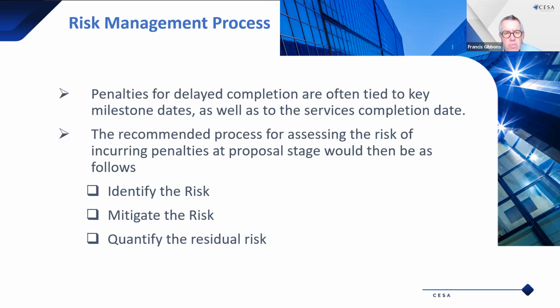And you might think, well, yeah, I suppose the worst case is that there's going to be a 10-day delay in the delivery of that particular deliverable, and let's use our commonly seen penalty of 2,000 Rand a day. So you've got a penalty of 20,000 Rand. Okay, that's not 100% certain that'll happen. You've got a probability, perhaps, that it'll only happen 20% of the time. So you then can get the expected monetary value of the risk, which is what you want to get to, which would be 20% of 20,000 or 4,000 Rand. So you've arrived at the expected monetary value.